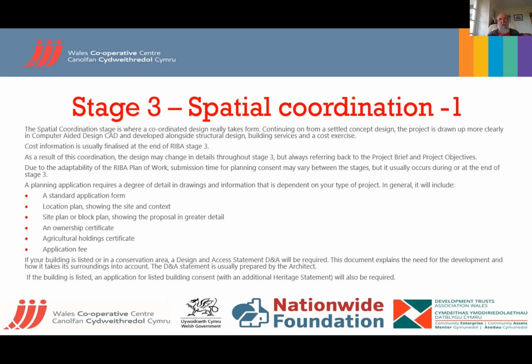So if you're buying a parcel of land off somebody and you want to get planning permission before you conclude the negotiations and exchange contracts, you can apply and say, I don't own the land, which is certificate A. It's certificate B, that you don't own the land, but you've notified the owner, who is so and so, that you are applying. So yes, you can apply for land that you don't own with consent of the owner. It wouldn't be a wise thing to do to go and get planning on somebody else's land without them knowing, I don't think.